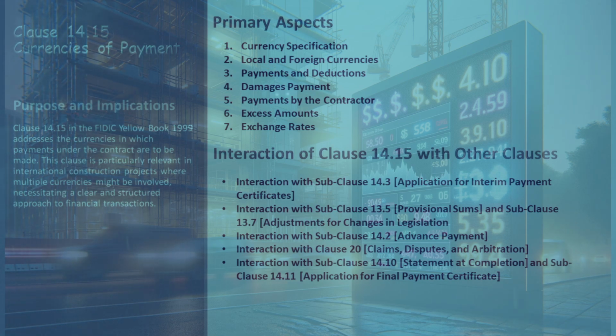The clause addresses situations where the contractor owes more in a particular currency than what is due from the employer, allowing for recovery of this balance from payments in other currencies. Finally, in the absence of specified rates in the appendix to tender, the clause defers to the rates prevailing on the base date as determined by the central bank of the country.